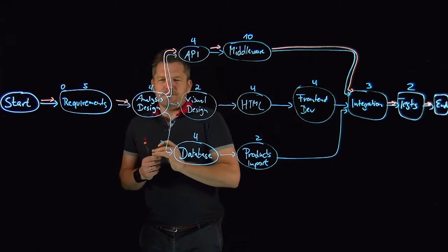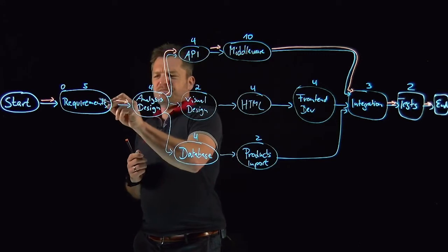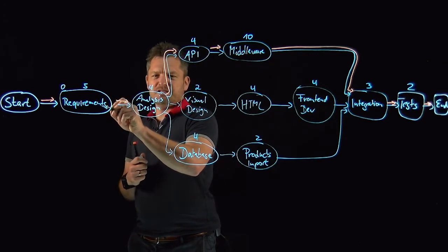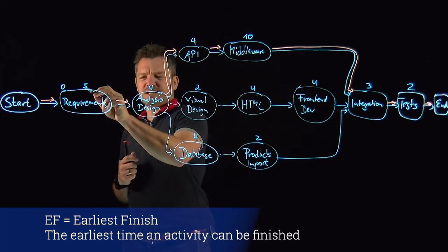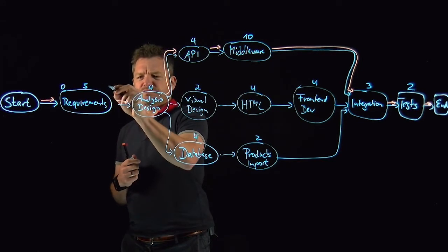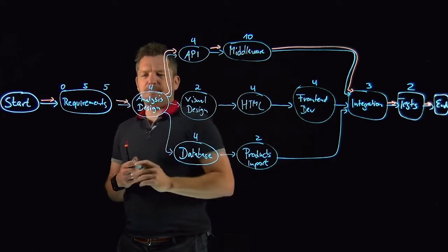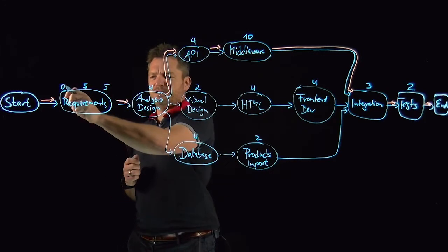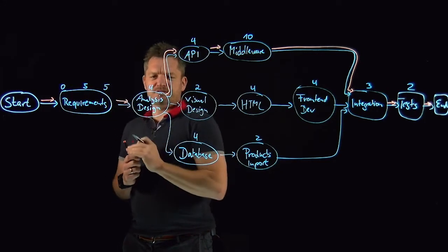And the earliest finish of this requirement task, this one takes five days as duration, so the earliest finish is of course then five days. So earliest start and earliest finish.